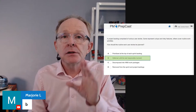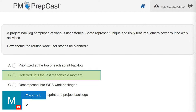Last responsible moment is a lean development principle. It's defined as a strategy of not making a premature decision but instead delaying commitment and keeping important and irreversible decisions open until the cost of not making a decision becomes greater than the cost of making a decision. This is an important principle to know for the PMP exam — planning something until the last responsible moment and only then taking it up.